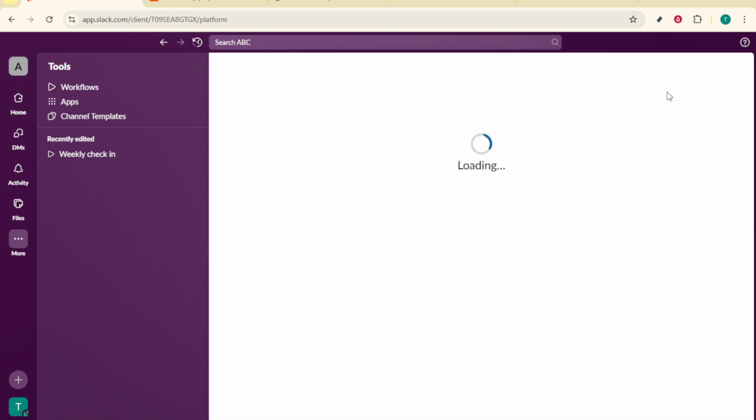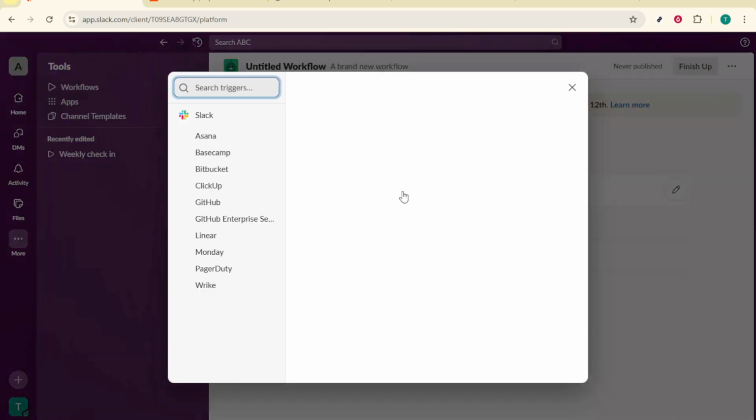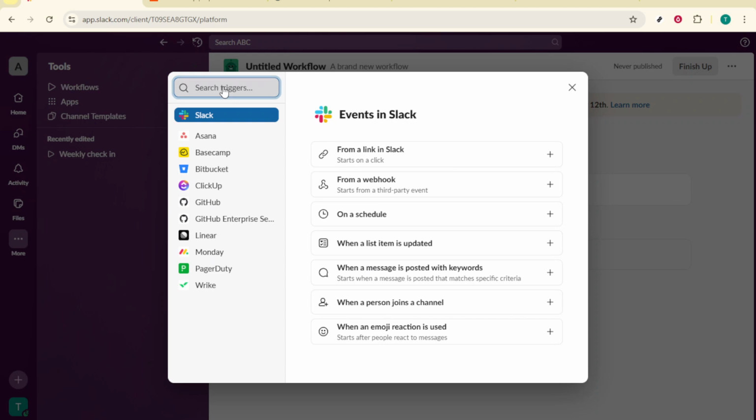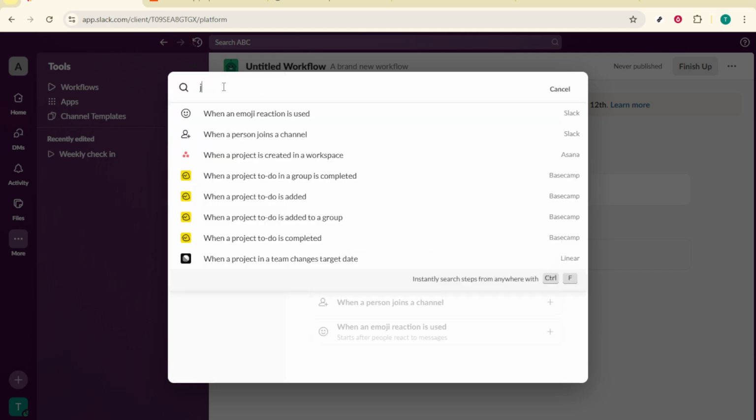Then choose the issue type, like a task or bug, add a clear summary, and write a helpful description. You can include links to messages, screenshots, or steps to reproduce. If your team assigns work at creation time, select an assignee. Otherwise, leave it unassigned and your triage process can handle it. When everything looks good, submit the form and your Jira ticket is created.